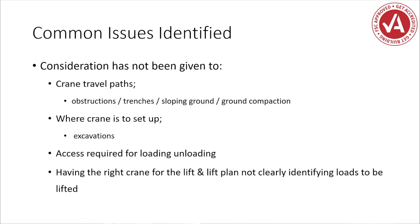Another thing not given appropriate consideration is crane travel paths. Cranes will have to traverse around the actual project, but we haven't clearly articulated on drawings or plans what the travel path is, or told the operator about it. We have obstructions, trenches, sloping ground, and ground compaction issues — all of which affect crane stability, especially with cranes right on the limit. If we have some subsidence, the crane jolts forward, the load swings out on radius, and the crane rolls over. It happens pretty quickly, especially in a frantic situation.